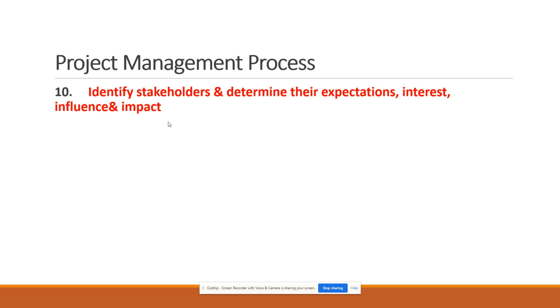For example, in Singapore, if you are doing some road projects, there will be stakeholders. If there are trees, there will be a separate agency, one stakeholder from whom you need to get the approval for cutting the tree and replanting the tree. If you cut the tree without getting the permission from that authority, your company will get a fine of some $30 million. I don't know the exact figure. I'm saying they will get some fine, and they may prohibit you from executing the project also. Maybe that also will happen.